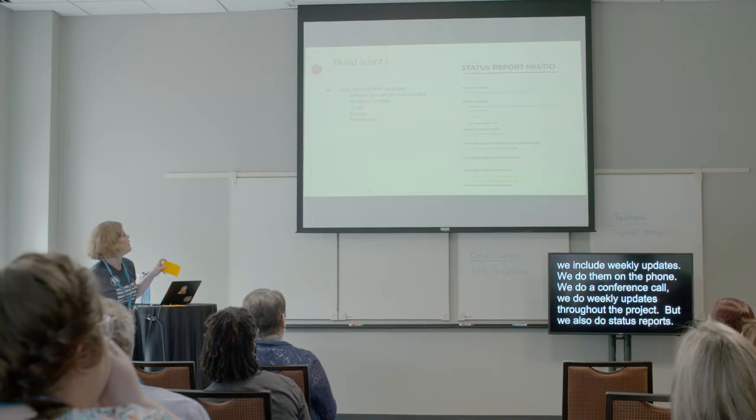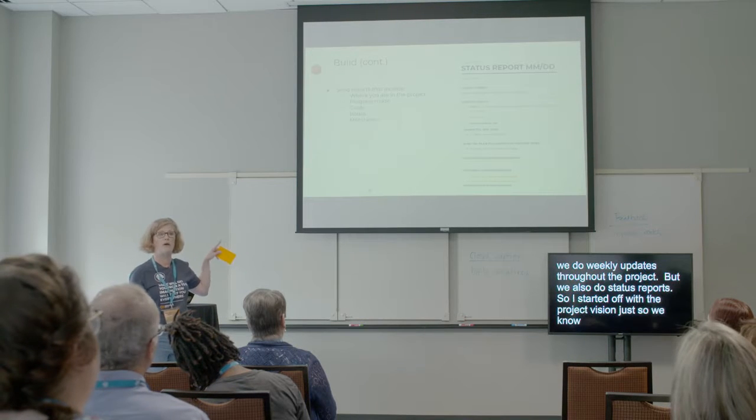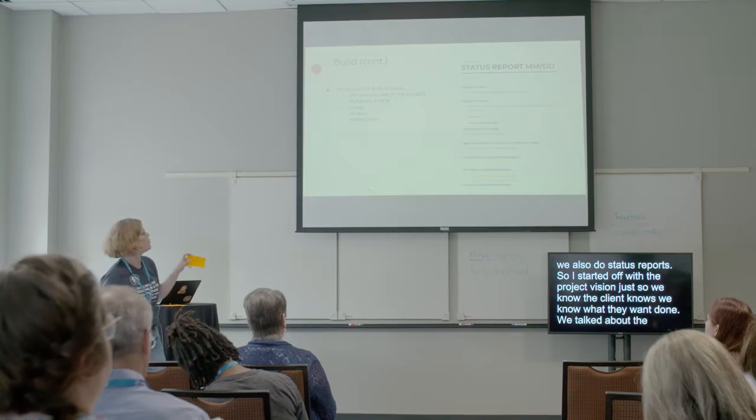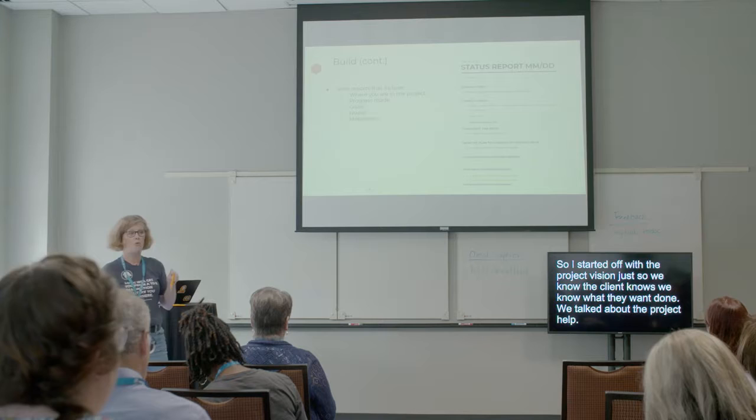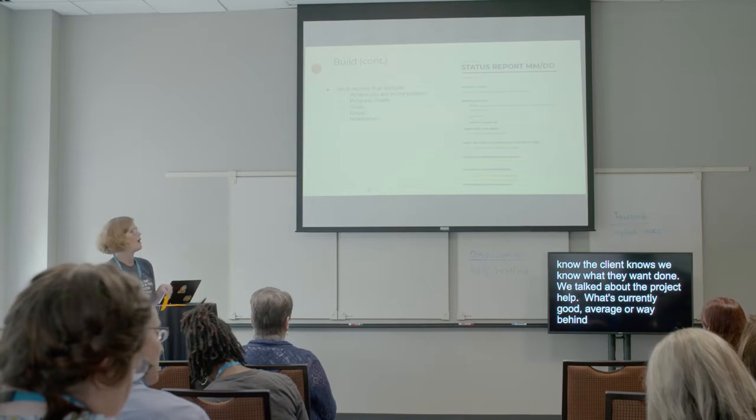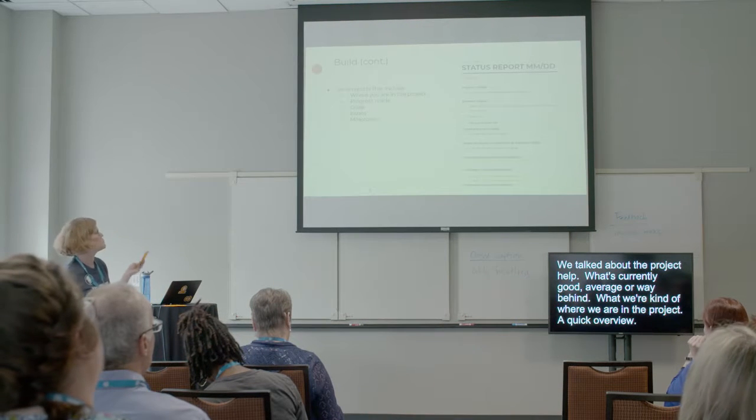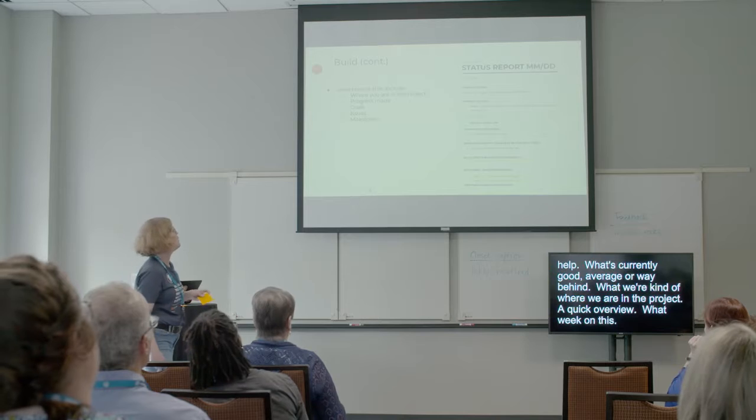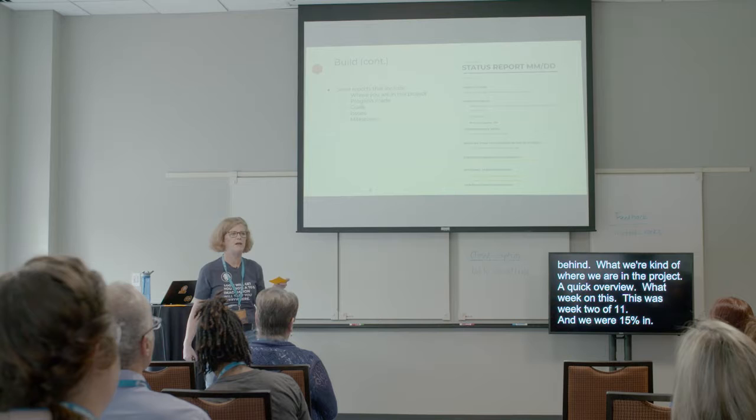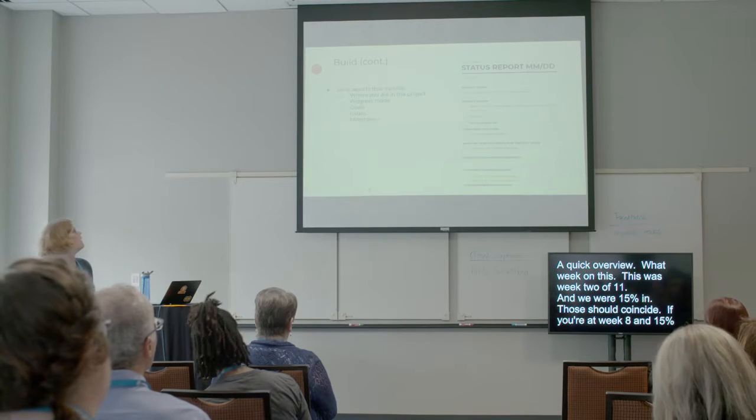But we also do status reports. So I started off with the project vision. Just so the client knows, we know what they want done. We talk about the project health. What's currently, if it is good, average or way behind. What we're, kind of where we are in the project. Just a quick overview. What week of this. This one was week two of 11. And we were 15% in. Those should coincide. If you're at week eight and you're 15% in, you and the client need to have a talk. And they'll see it right there.